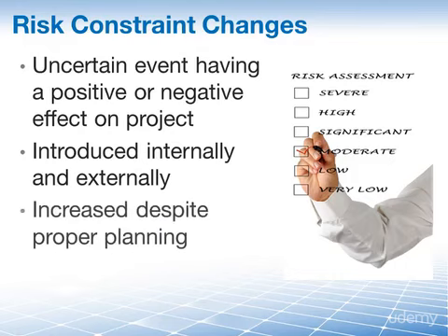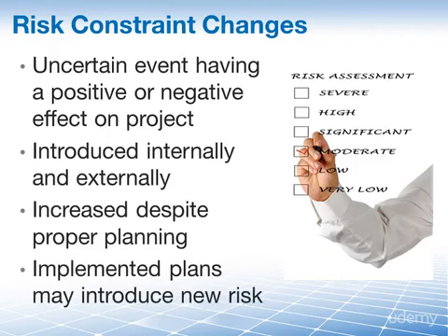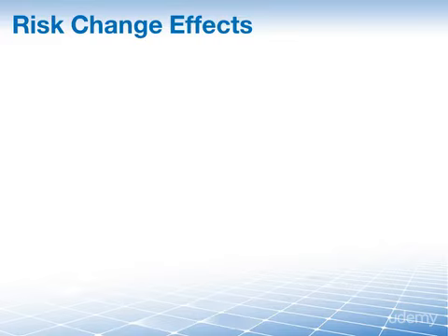Resources may also be increased despite the fact that effective risk management is being performed. It is impossible, or not worth the effort, to determine every possible risk that may occur on your project and develop an effective risk response plan, since it's simply not cost effective. In addition, the level of effort that is involved in implementing risk response plans may be underestimated in terms of time and cost, and sometimes may even introduce additional risk to the project. Let's once again take a look at how this affects the other project constraints, in particular schedule and budget.